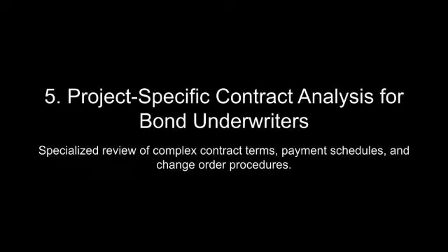When a subcontractor's design error led to significant structural issues, the project owner filed a claim against the performance bond, arguing that the contractor was ultimately responsible for the error. The surety was forced to address the claim despite the existence of an insurance policy that should have provided coverage. This case highlights the importance of aligning insurance requirements with bonding obligations to ensure that all parties understand their roles and responsibilities in managing project risks.